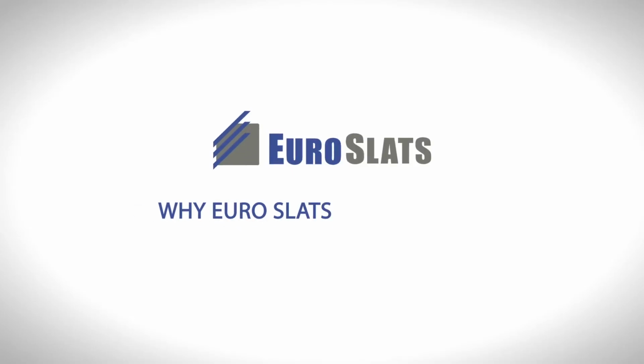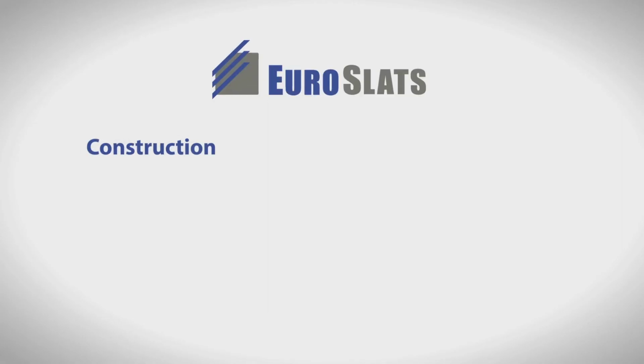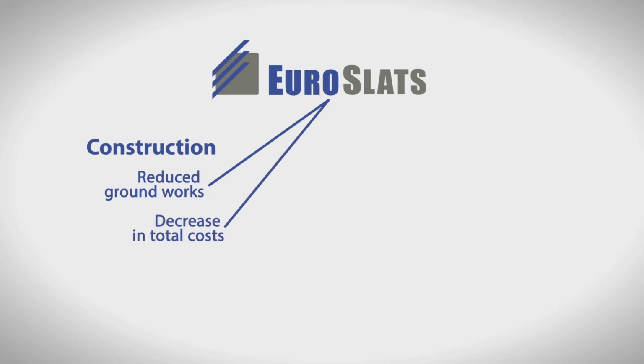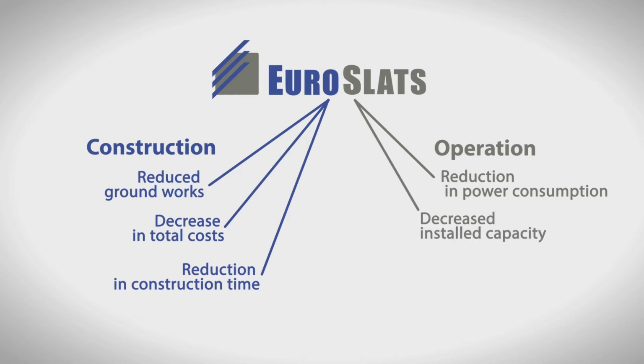Why EuroSlats technology? Groundworks reduced by up to 30%. Total construction costs decreased by the average of 15% or 10% compared respectively to steel and reinforced concrete structures. Up to 30% reduction in construction time. Up to 40% reduction in power consumed by heating and ventilation systems. Installed ventilation capacity decreased by 25%. Over 30 years of the building's service life.